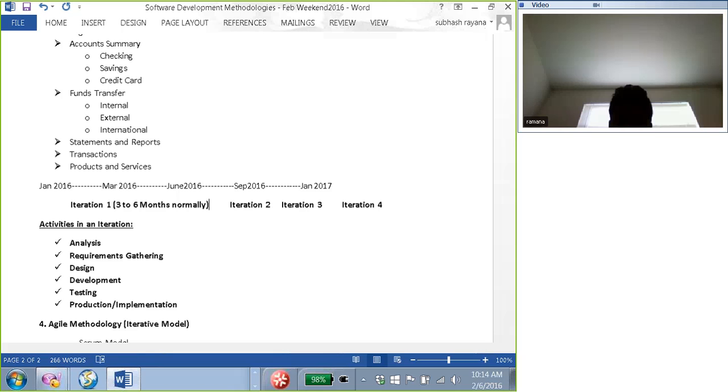And who is going to suffer at the end of the day? It's the technical team. An activity which takes 2 months, they're asked to deliver in 45 days, which obviously means they have to spend additional time to implement, and it is stressful for everybody in the project.